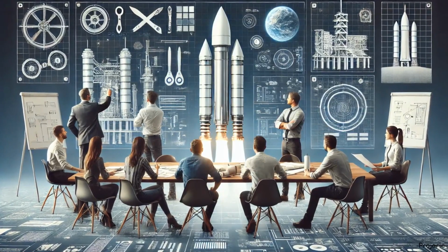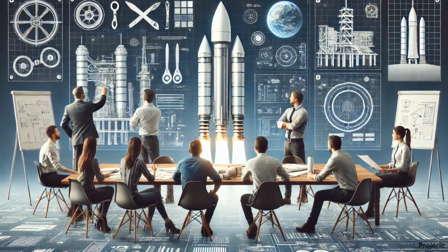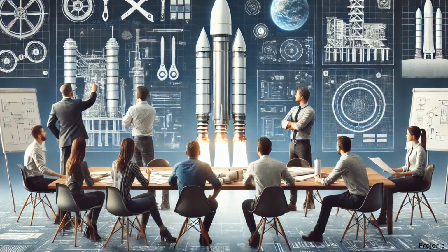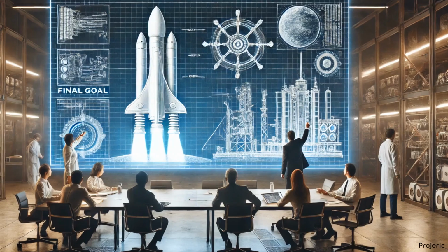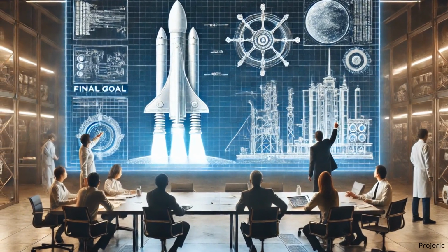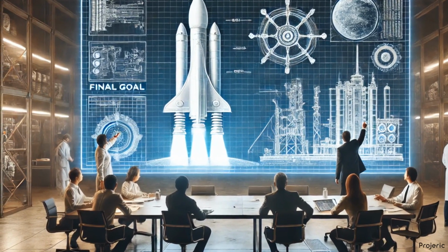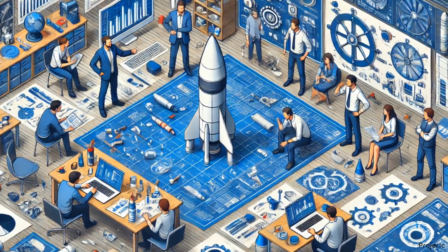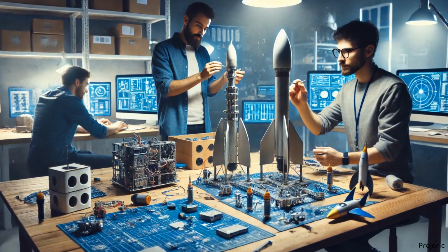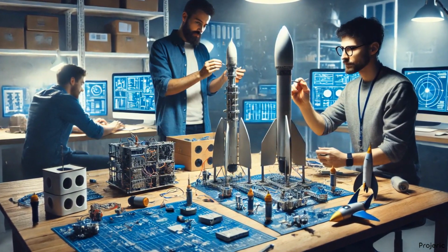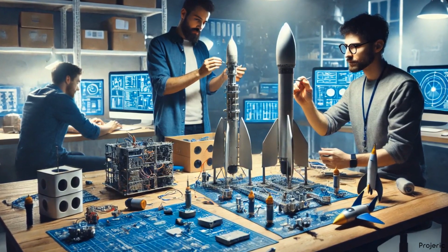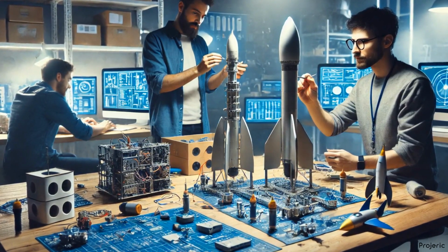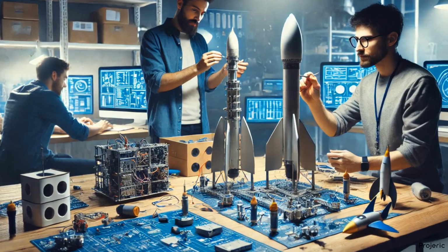To illustrate a project using an iterative approach, imagine that a project team is designing a new high-technology product, a rocket, let's say. In this scenario, the desired end state of the product is known. However, the project team needs to figure out how to get there. As there are lots of uncertainties about how the rocket will be built, the project team builds a prototype and continuously analyzes and enhances it in each iteration until the design works.